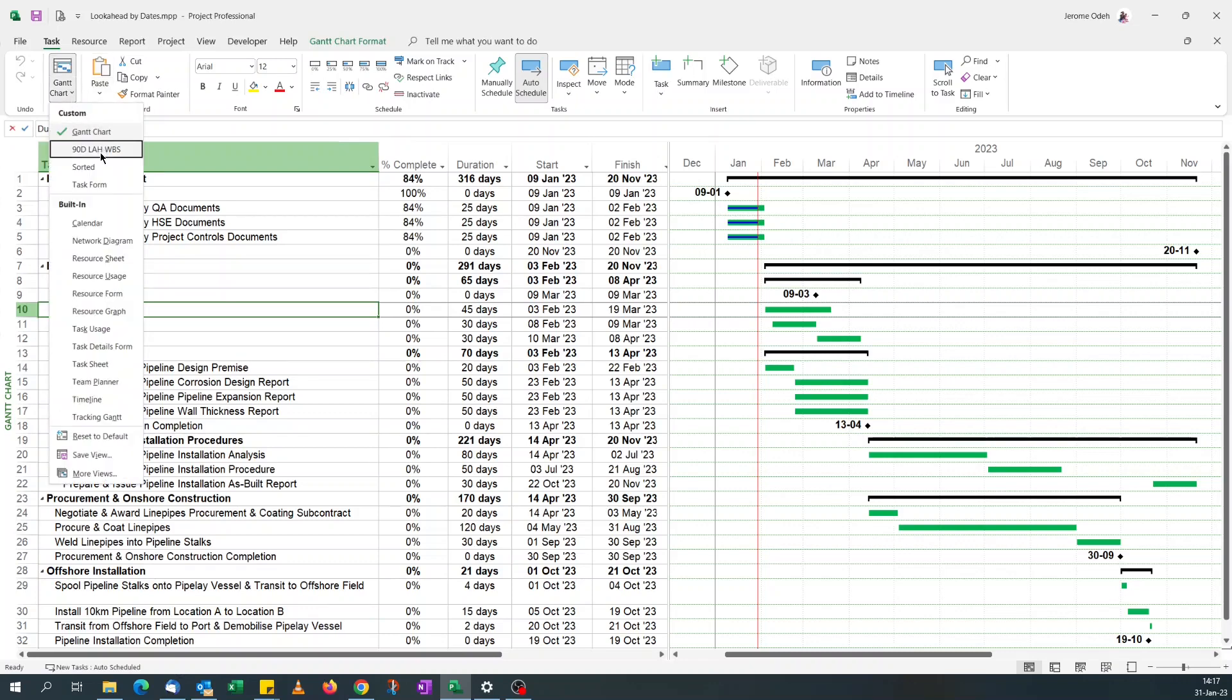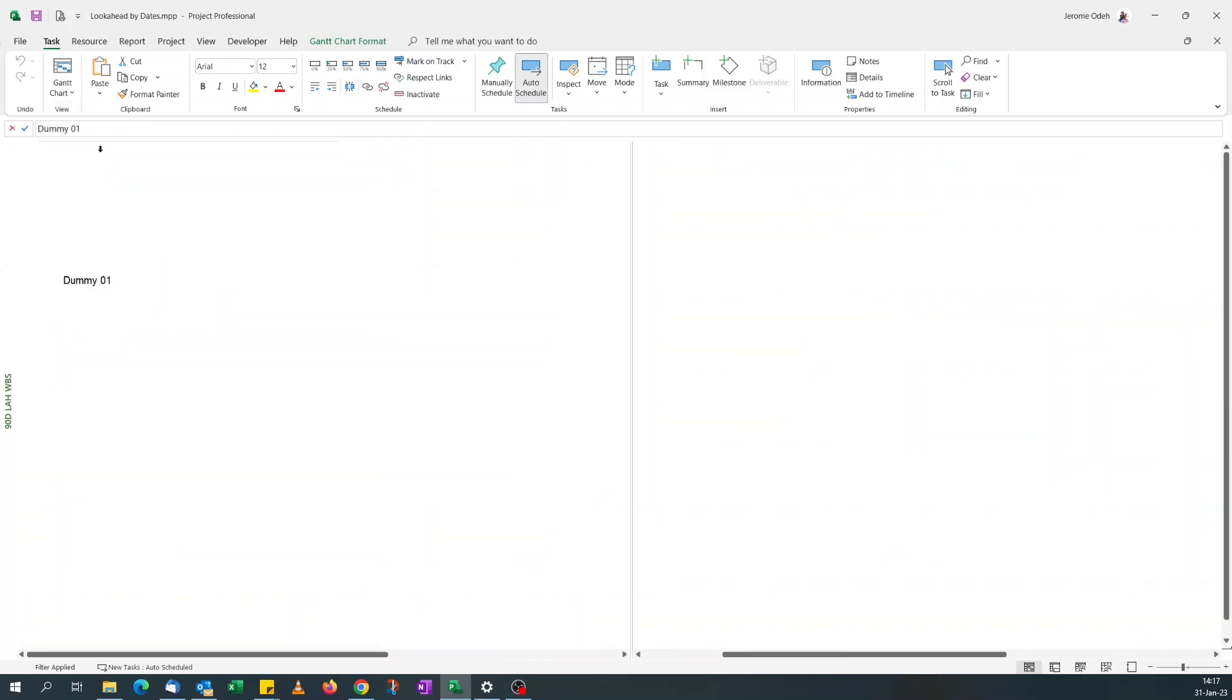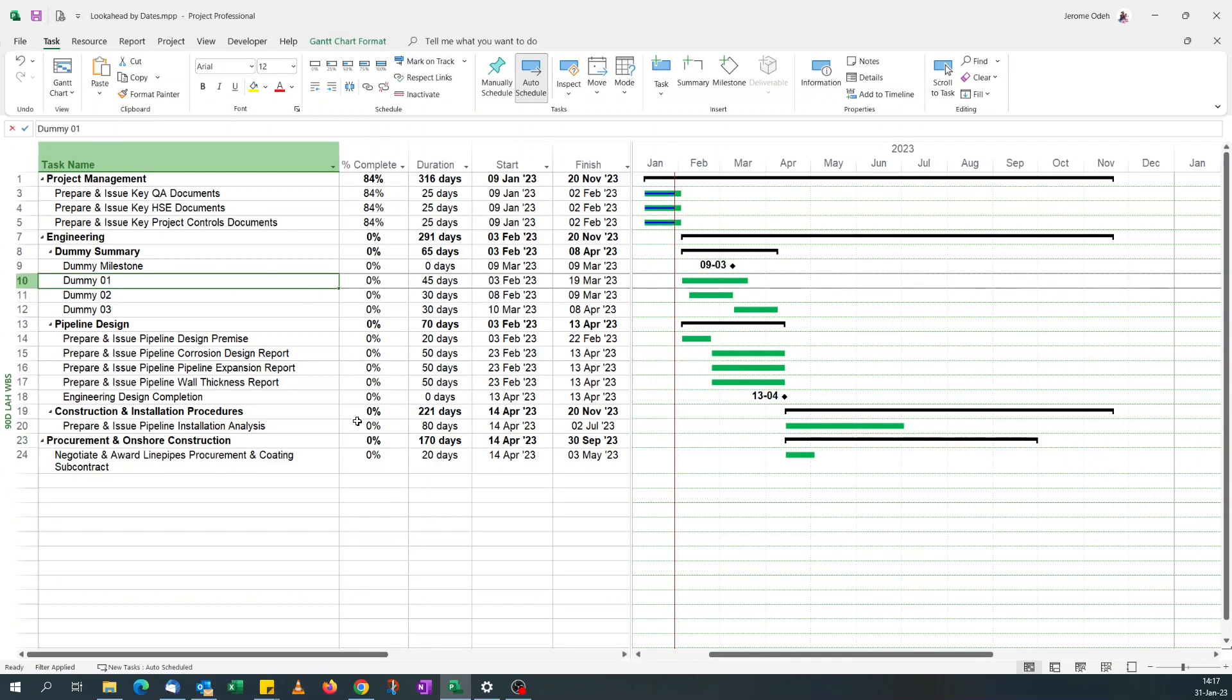So this time it's a 90-day look ahead. If I select that view, these are the tasks that are either in progress or will be starting in the next 90 days.